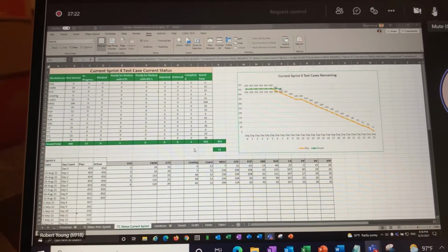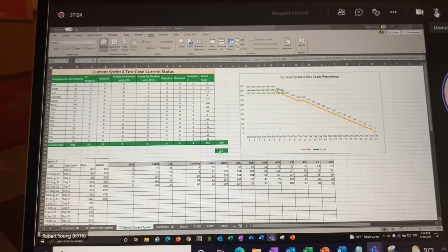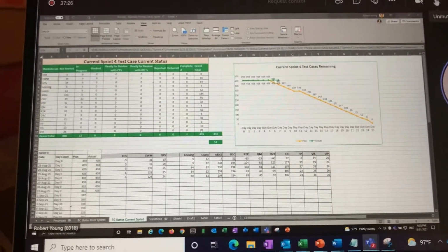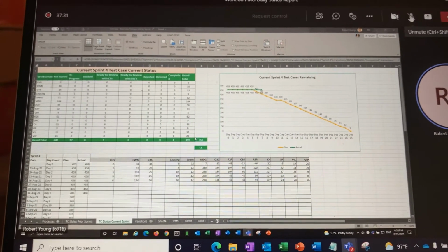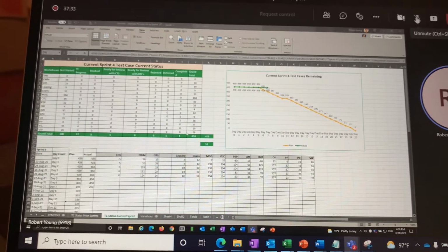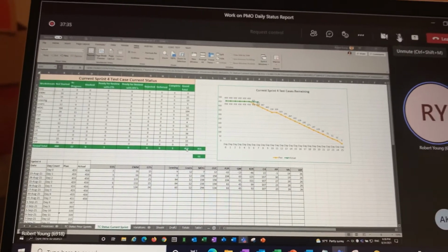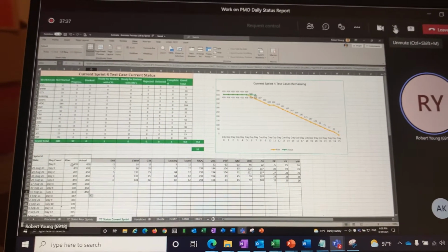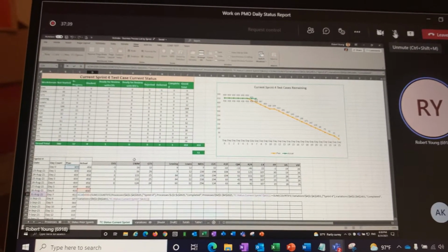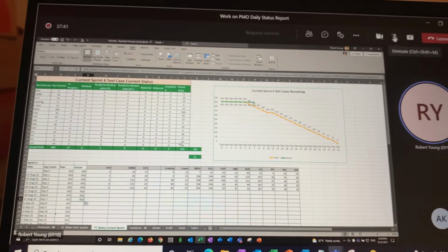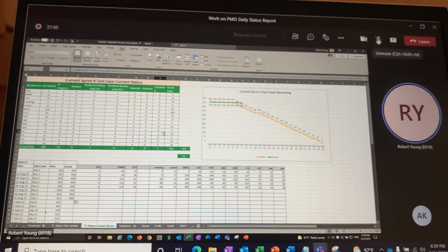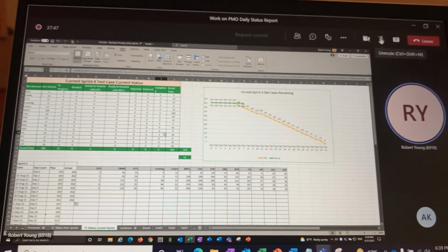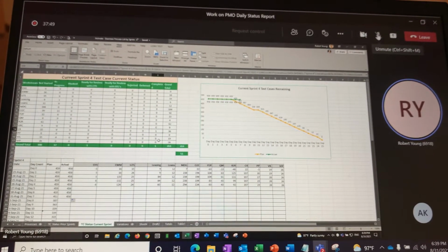Yeah, so what this means is that the total expected number of processes and variations that need a test case is 459 for sprint 4. So we're starting here. But it looks like somebody created a test case before sprint 4 started. So it's already complete.